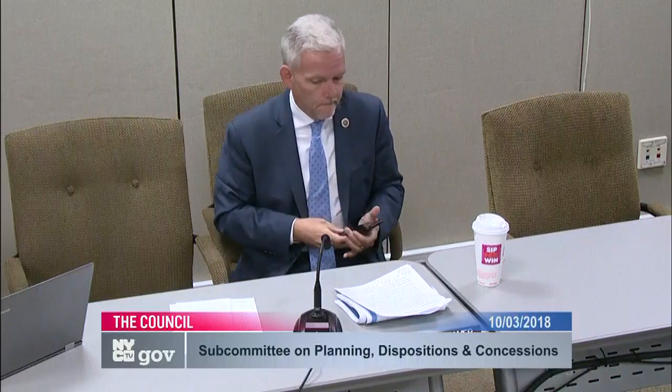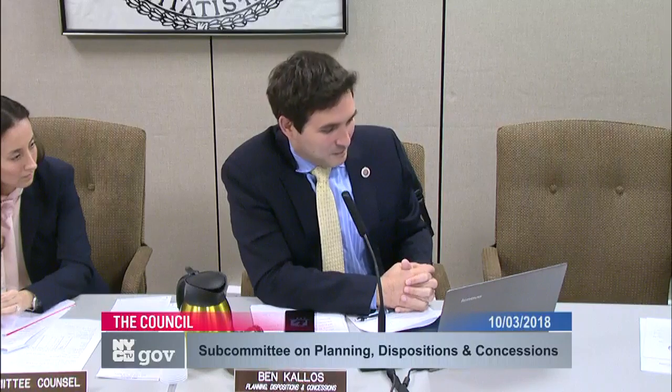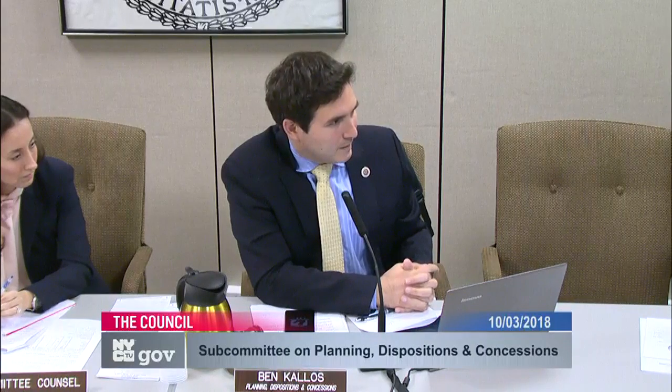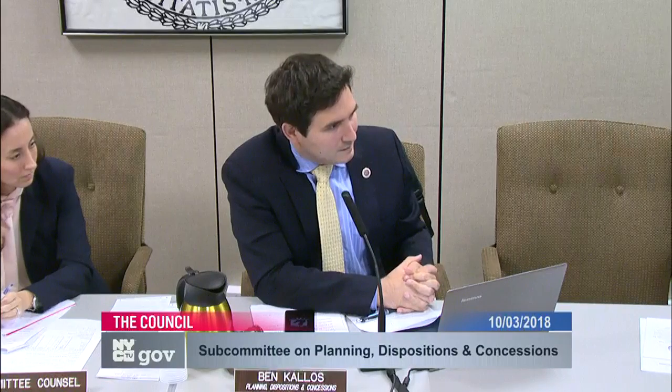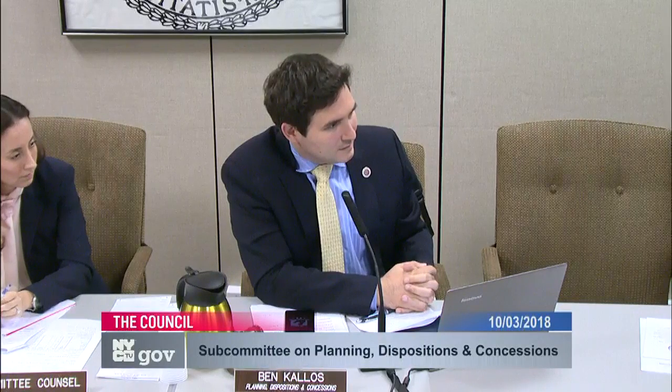What has been the experience for TF Cornerstone as these delays have come up through HPD and unforeseen easement issues, and how could the city be a better partner to you? We had to work through the easement requirements for Amtrak, the Long Island Railroad, and the MTA, all of which have easements under the site. But the killer was a New York Power easement.